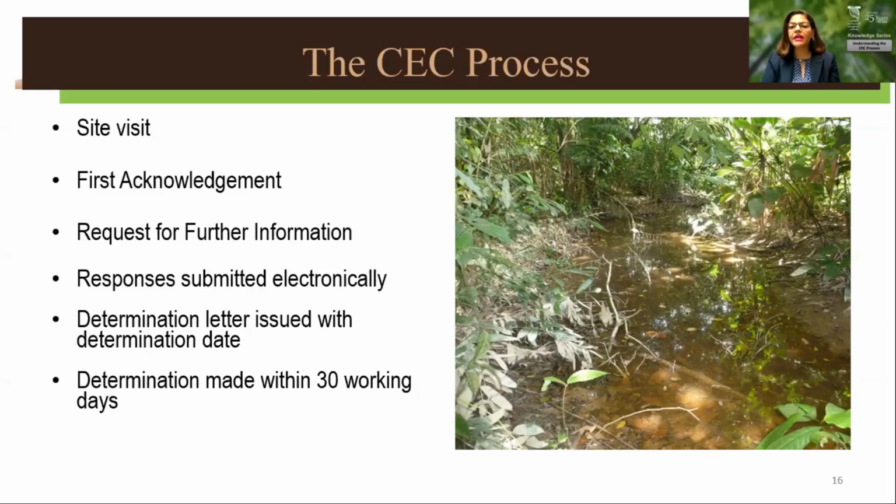And this process is usually done in consultation with the applicant and the assigned officer. So the officer continues to work with the applicant as we go through the entire CEC process. At this time, in light of COVID-19 restrictions, the EMA is accepting these responses electronically at our website, at our email address at cec@ema.co.tt. Once the information has been reviewed and assessed, then a determination is made within 30 working days from the date of receipt of the information.